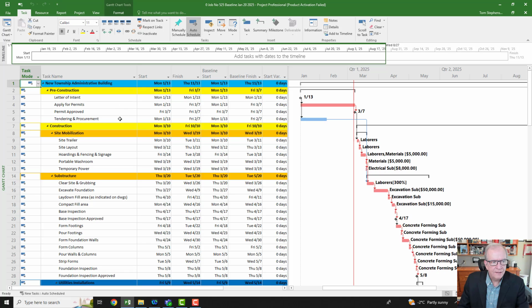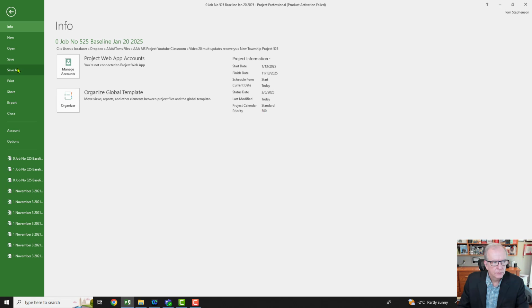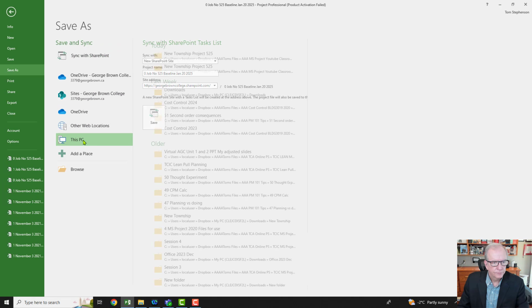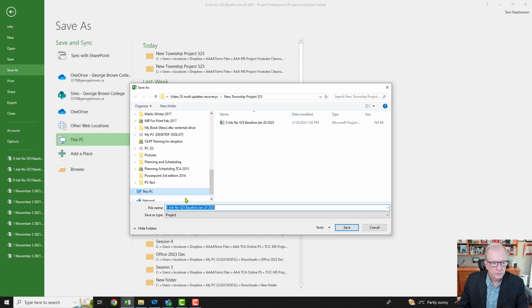So now I'm going to save this as an update file. Before I go any further, now that we've got the baseline set in this file, I'm just going to go File, Save As. I'm going to go into here. I'm going to change the name here to 1. That's the first update that we're doing. I'm just going to go in here and I'm going to say Update.